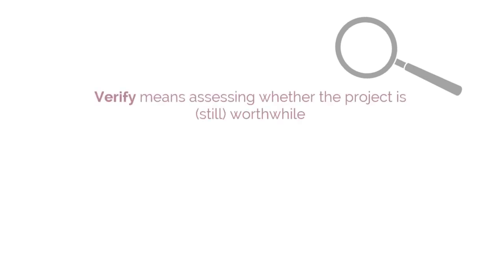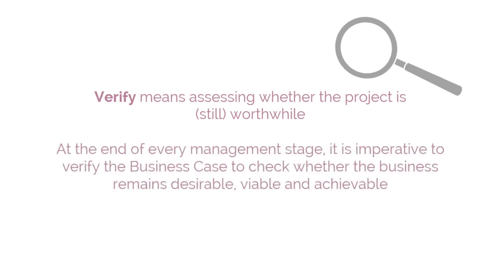Now, what do we mean by verify? Verify means assessing whether the project is and remains worthwhile. So, you had the business case management product where you have the business justification documented. At the end of every management stage, it is imperative that this business case is verified to assess whether the project is and remains desirable, viable, and achievable.